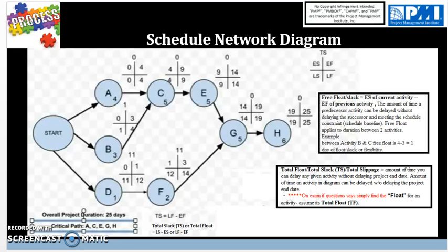And you can see here that the critical path is A, C, E, G, and H. And that is typically the total slack or float of path of zeros. So 0, 0, 0, 0, 0. That is the pattern that you will see. The shortcut for the exam, since you only have a minute or so a question, is to just add up these durations. 4 plus 5 plus 5 plus 5 plus 6. That gives us 25. So A, C, E, G, H gives you 25. Well, let's see. 3, 5, 13, 18, 24.